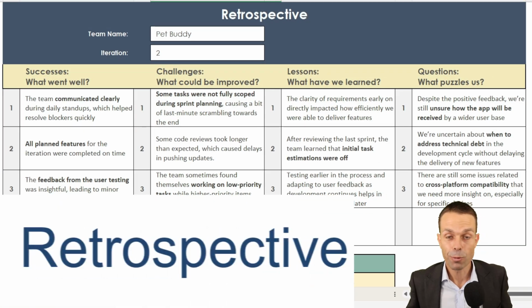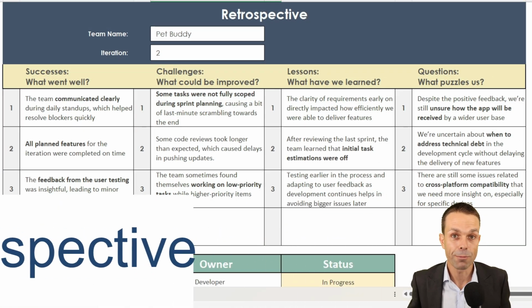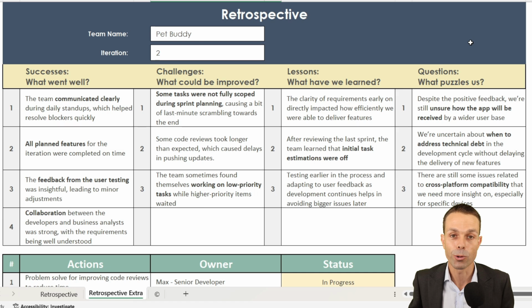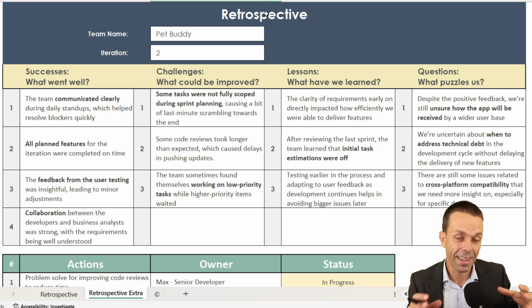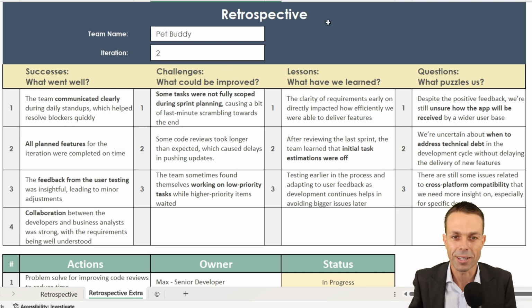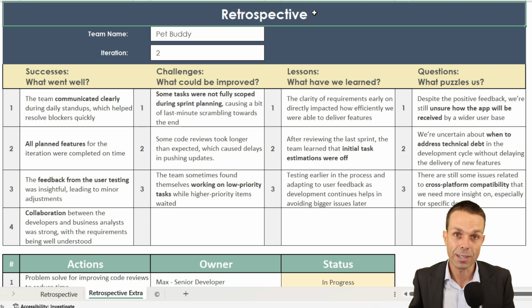And then lastly, as we've been working together in a team for some time, we're going to go through a retrospective. A retrospective is an agile term or an agile idea where we meet at the end of our iteration. Usually an iteration is 2 weeks where we've delivered a small item to the customer so they can see it and give their feedback. And then a retrospective is for us to improve our ways of working as a team.